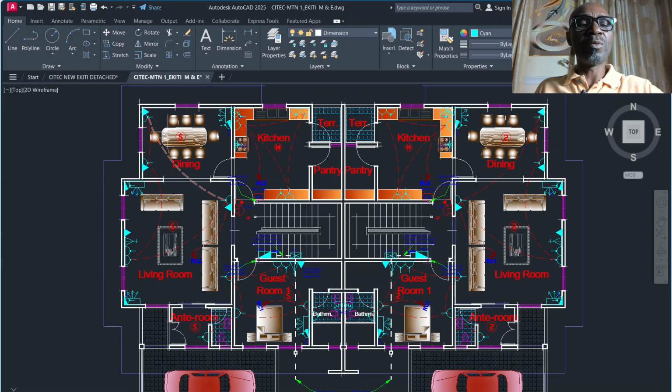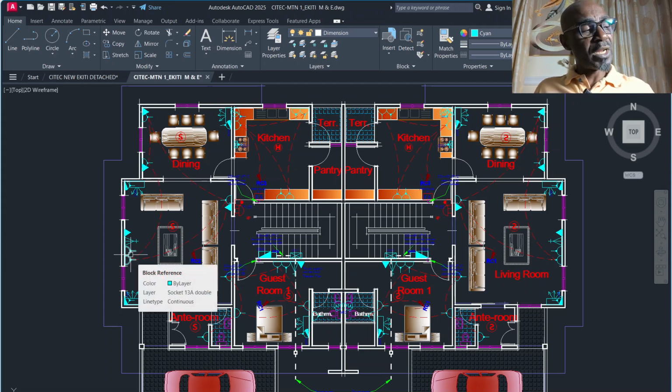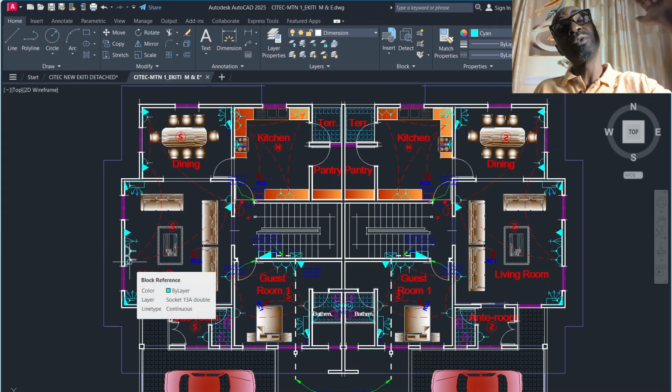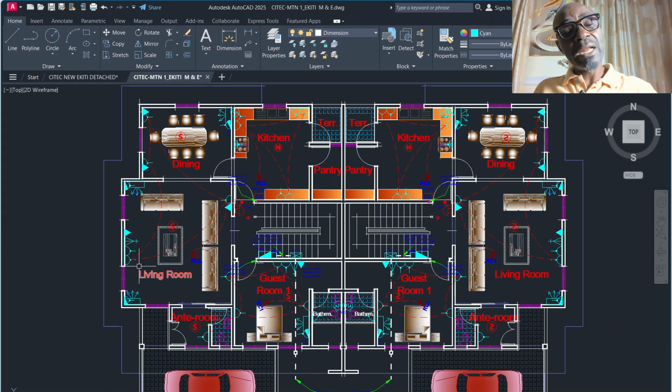I'm given this drawing. What I need to do is I have a supply coming from this point to this point. I know this socket is going to be, say, 500 above the floor level, and the building is a 3-meter height to the ceiling. So I'm taking 500 out from the 3 meters. It takes me to the inside of the ceiling. Then I measure, if I'm taking it straight off like this, because mostly this curve doesn't apply.